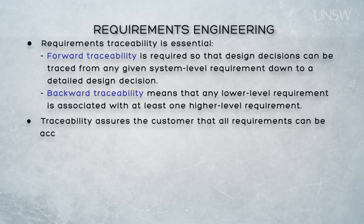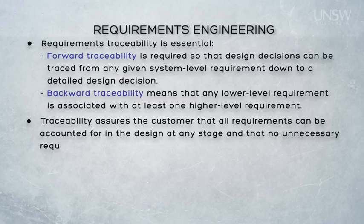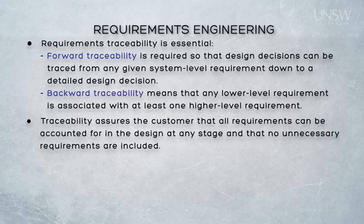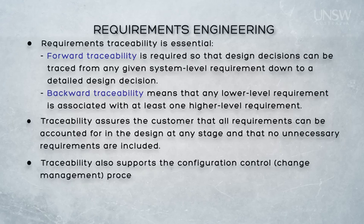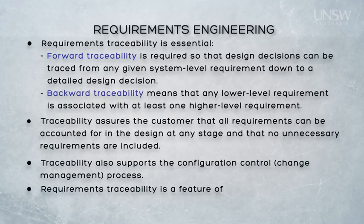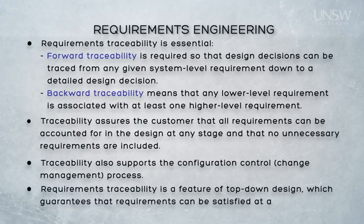This traceability is important since the customer has to be assured that all of their requirements can be traced forward into the design. Furthermore, any part of the design that can't be traced back to a high-level requirement is probably unnecessary work — something for which the customer isn't prepared to pay. Traceability also supports configuration control: if we need to change a requirement, we can see where it came from and what the impact of the change is. Support for requirements traceability is a feature of the top-down approach, providing a mechanism which guarantees that the requirements can be satisfied at any stage.